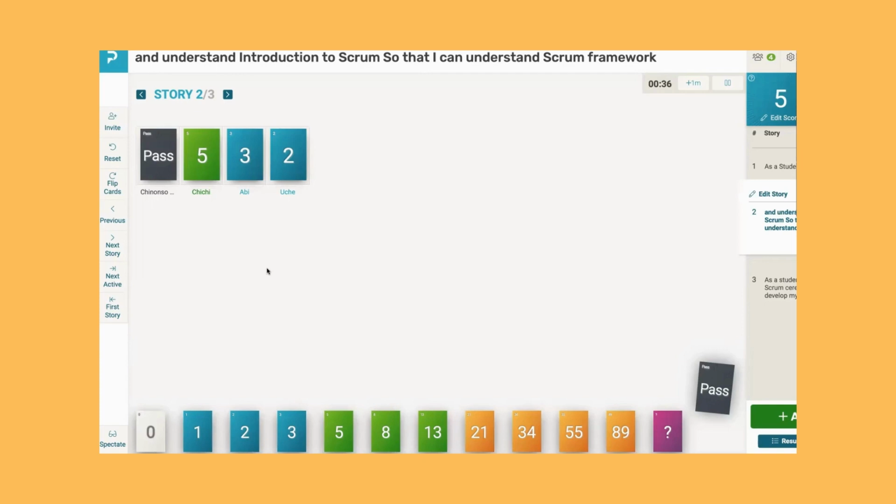That's story number one. Number two, I can still do this story independently. There is no unknown, but there are a few more things I need to click. There is stuff I need to add, some tweaks I need to do, a link that I need to put on the website. So it may take me a day or two to get this done. I still have to do a little bit more work on this story. So the task you're giving me, that's 2 story points.